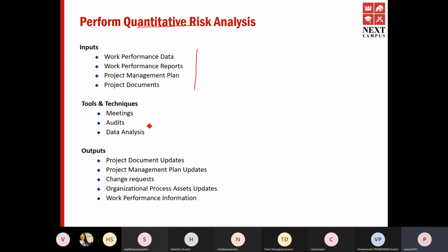We hosted the project in AWS, in cloud. We executed the project for about 4 or 5 months. We realized the architecture that we initially proposed has a lot of constraints in rolling out the project. When we started implementing certain features, we realized we can't do them properly.